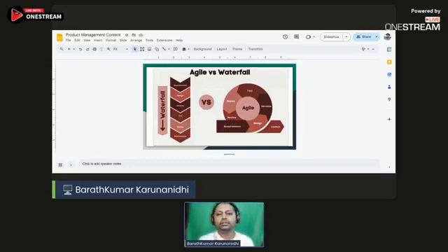We have something called the sprint retrospective. In the sprint retrospective, the teams who were involved in the project development phase sit together and discuss what went wrong, why it went wrong, what we could have done better, and what all went well. We discuss that, and we note down the points based on the feedback and the interaction we have with the team. Whatever has gone well, yes, we'll appreciate that, and we try to keep that in the next iteration as well.